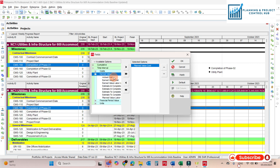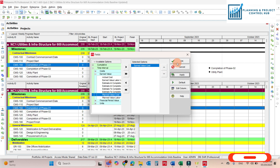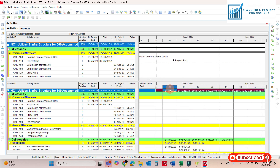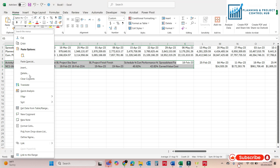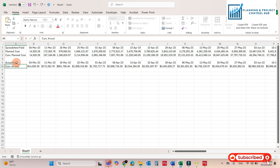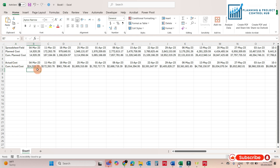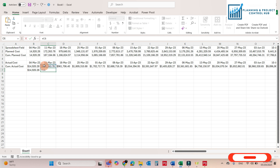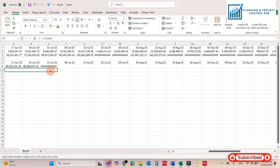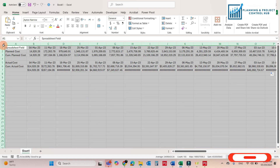Click Earned Value from here — Earned Value Cost. Remove the unnecessary one and apply. Now we get the Earned Value Cost here. Copy it and paste it here. Remove all the unnecessary columns and move to the left. Write here: Actual Cost, or you can write Earned Value. The cumulative actual cost is equal to this, then equal to this plus this. Move the formula forward up to 7 July, because this schedule is updated up to 7 July.